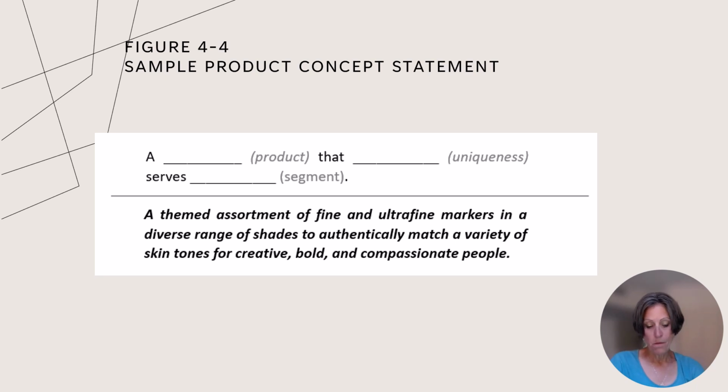Stage 3. There are many critical new product development activities occurring during Stage 3 of the staged and gated process. Based on customer feedback from the product concepts, 1 or 2 lead product candidates are identified for further technical development. With this selection, formal models and prototypes are designed and evaluated. Manufacturing, distribution, and selling costs are estimated with a high degree of accuracy since the product design will be pinned down by the end of Stage 3.